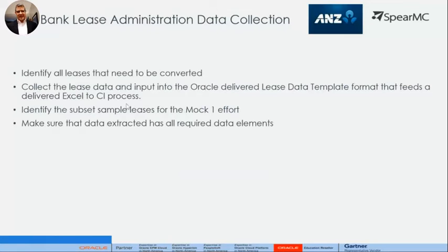They were all scattered, and so we needed to start to corral those in Excel, and that simply took more effort than we had anticipated. And I think we did a credible job. It was actually started by the ANZ team before we even began the project, and just rounding that out and making sure that we had everything covered took more time than we thought.